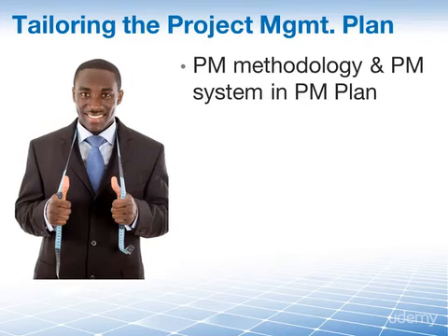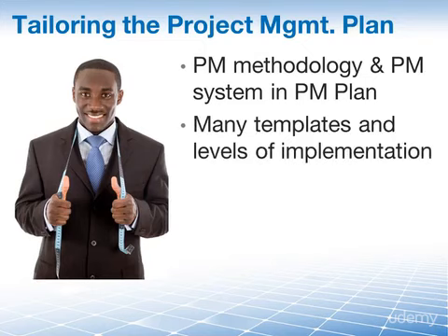And here's what tailoring means in an example from my own work as a project manager. The project management methodology that one of my former companies uses is part of a project management system. There are about 50 templates in this methodology, and the empty templates, I'm saying the empty templates, when you print them out, are about 400 pages long.